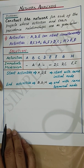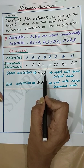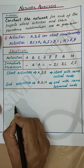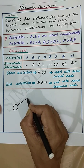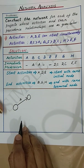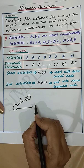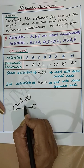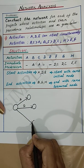Let's now draw the network diagram. Activities A, D, and E are the initial activities, so let's first draw these activities. We draw activity A, then activity D, and then activity E.